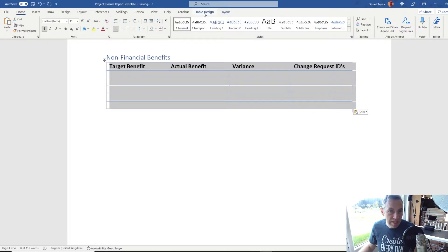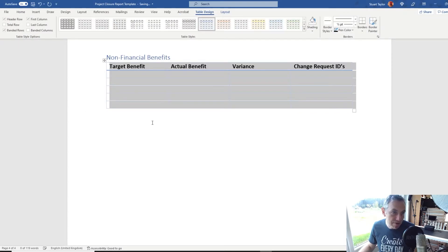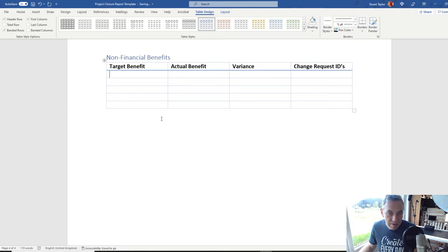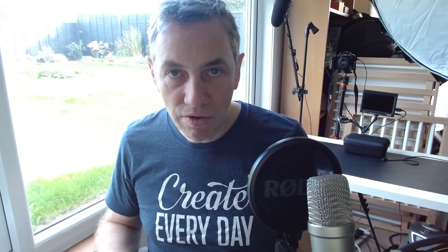Select Heading 2 again and add a section called Non-Financial Benefits. This time we can just have a straight copy of the table — go to Table Design and get rid of the total row. The content in the non-financial benefits table is going to vary a lot depending on the project. It could be that you made things faster, better quality, better customer experience, and so on — any kind of measure. If you log your target benefits from the start of the project against your actual and explain the variance, it still works.